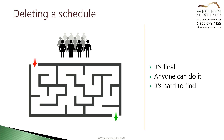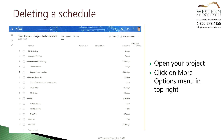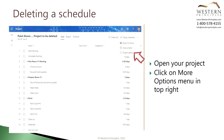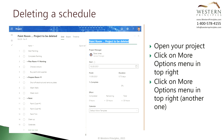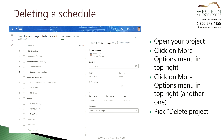Start by opening the project you want to delete. In the top right corner, click on the More Options menu. From that, open up the project details. Then open the next More Options menu from the top right, and here's where you can delete the project. When you pick Delete Project, you'll get a warning and you can go ahead and finish your delete at that point — but only if you're really, really, really sure that you want to delete it, because it is permanent.